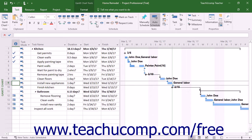As used within Microsoft Project, a critical path is the set of tasks that, if delayed, would extend the end date of a project file. The term critical, as used in this context, has nothing to do with the importance of the task to the overall completion of the project.